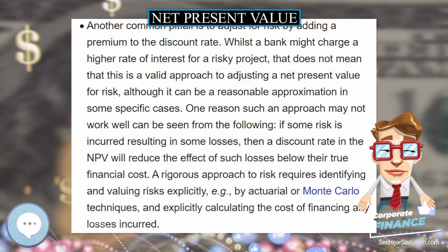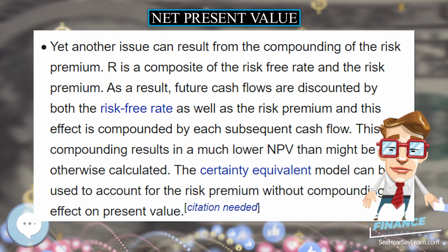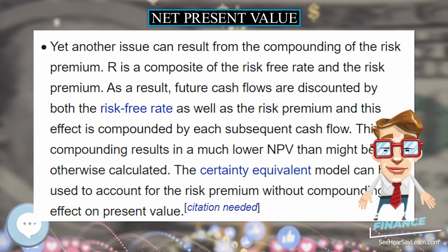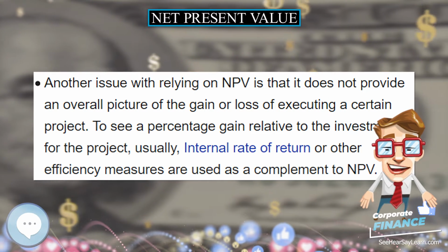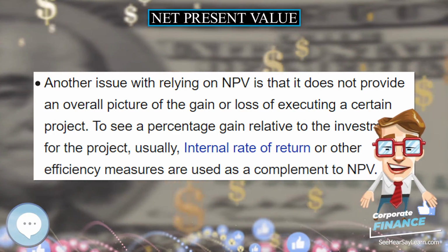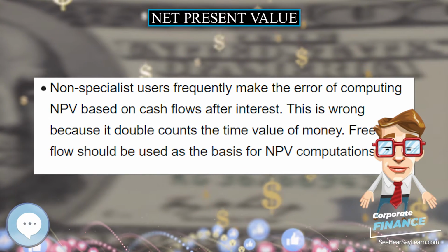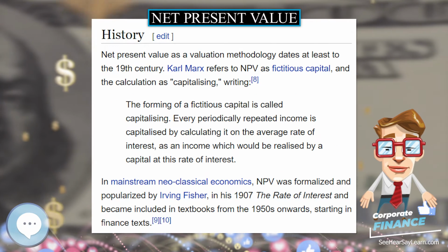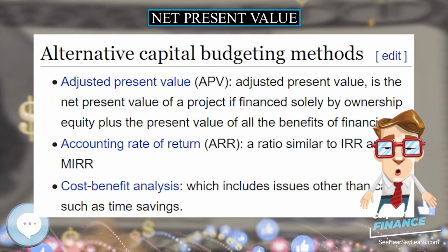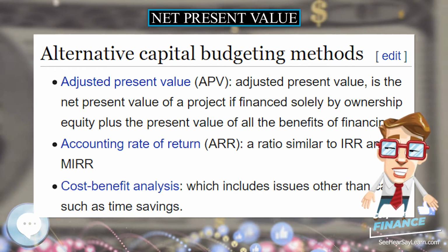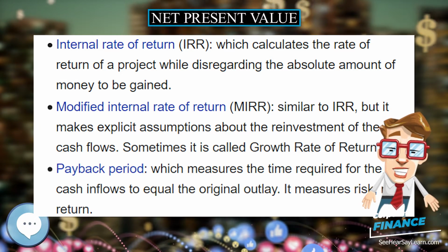The discount rate. The rate used to discount future cash flows to the present value is a key variable of this process. A firm's weighted average cost of capital, after tax, is often used, but many people believe that it is appropriate to use higher discount rates to adjust for risk, opportunity cost, or other factors. A variable discount rate with higher rates applied to cash flows occurring further along the time span might be used to reflect the yield curve premium for long-term debt.